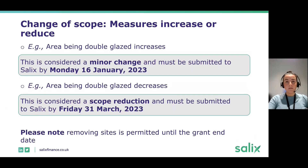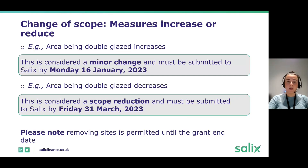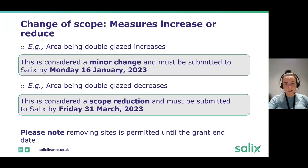If existing measures increase in scope — for example, if the area of windows being double-glazed increases — that's a minor change and can be submitted by Monday the 16th of January. We'll need to reassess it so we're aware of any changes to gas savings, and those changes can be authorised at this stage of the project.